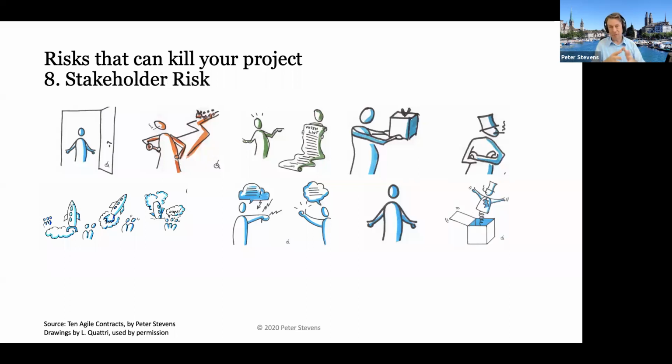Dependencies are number 2 on my list of the things that are really evil for your project, right after bugs and multitasking. Okay, the next risk that we have is stakeholder risk. Now, a stakeholder is a nice word for anybody who can helicopter in and completely change the assumptions of your product. For instance, you're making a router and you say, we're going to build a product that doesn't have any network plugs. And then you come back 6 months later and say, well, actually, we want to have 4 plugs. You've just thrown out a huge amount of design work because the stakeholder has changed their mind.